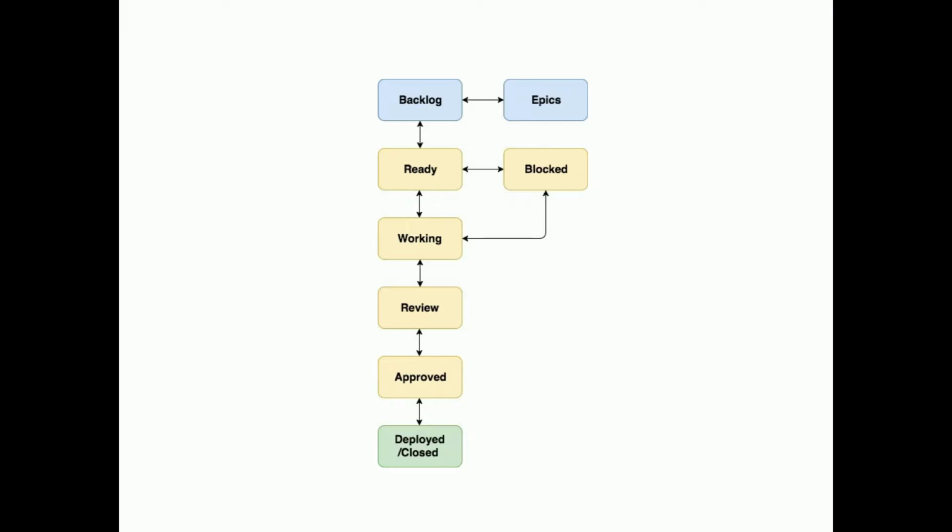So when I'm looking at HuBoard, I've got all my columns, and now my first column is my backlog column. So that's why it's kind of not traditional to have that status. And then from there, I also have another status for my epics, because I want to identify them but I know that those epics are not moving through the rest of the process. Those are just my larger tickets that are holding all of the information for the stories and tasks that go along with it. What's your definition of an epic?